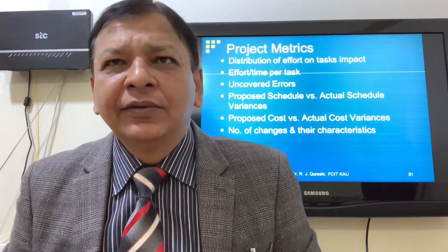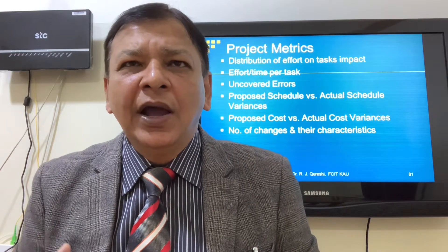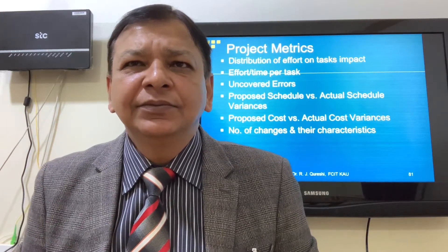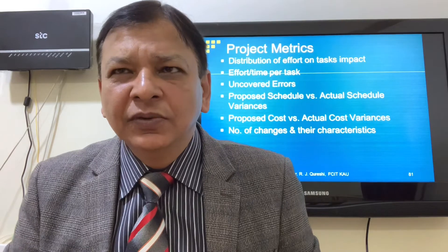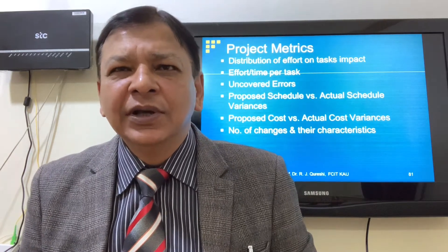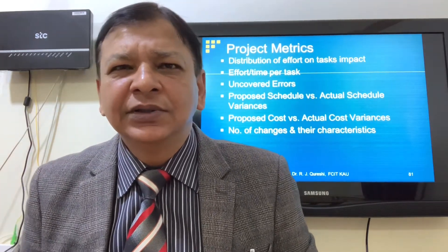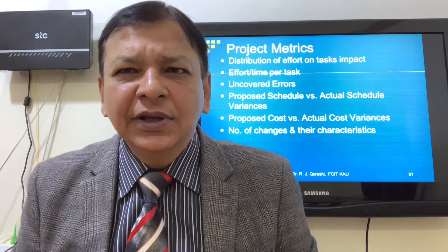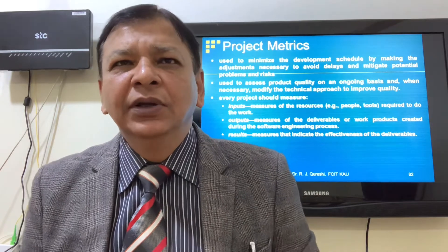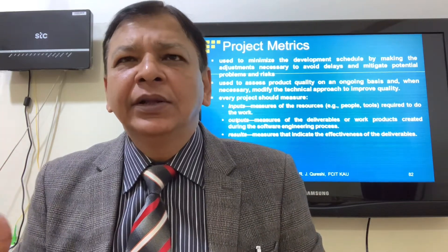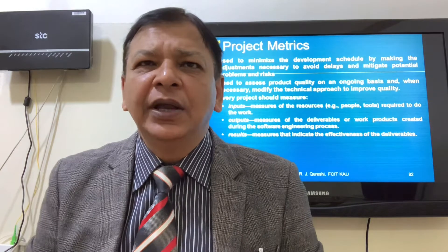Project matrix includes: distribution of effort on tasks by impact, effort over time per task, uncovered errors, proposed schedule versus actual schedule variances, proposed cost versus actual cost variances, and number of changes and their characteristics. Project metrics are used to minimize the development schedule by making adjustments necessary to avoid delays and mitigate potential problems and risks.